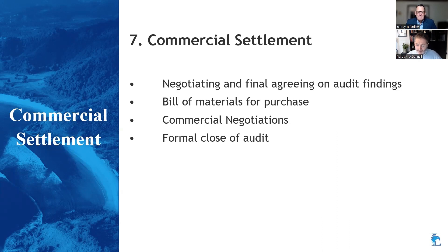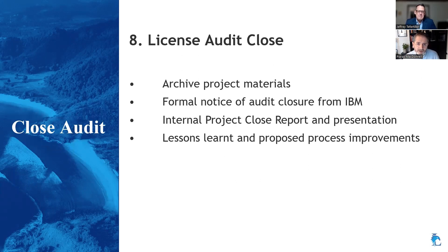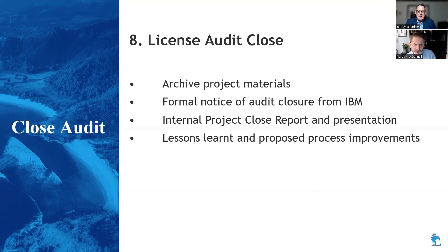Then we reach the final close. The last step in the audit is a license audit close, and this does get neglected very often. When you've just done the deal, you just want to forget about the project and hopefully not deal with it for another three years. But I do strongly advise that you record the lessons learned. Archive all your material and evidence because it may be a very good starting point for your next audit — and unfortunately, mistakes repeat. You will want to make sure you get formal notice of closure from IBM, so the door is closed on those past compliance problems. Go through the project yourself and ask: how did this go well, how did we react, can we improve our audit responses for future audits? Record and learn those lessons.